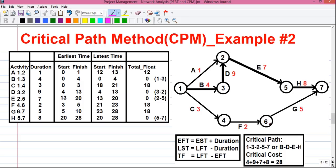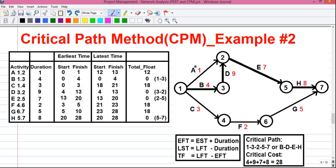So here the network is already given. For some basics, the circles represent events and the arrows represent activities. An activity can be represented in two ways: by its name or alphabet, like activity A. Activity A can also be represented as 1-2, where 1 represents the start event of activity A and 2 represents the end event of activity A. There are numeric values that represent the duration of activity in weeks. For example, activity A requires 1 week to complete.